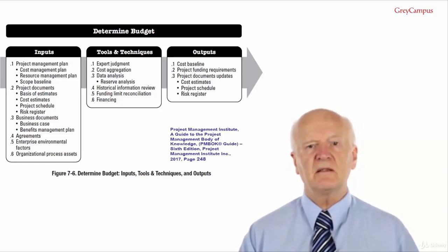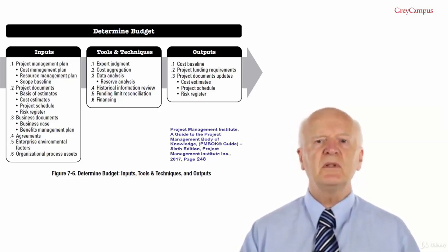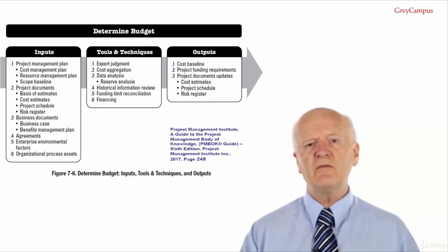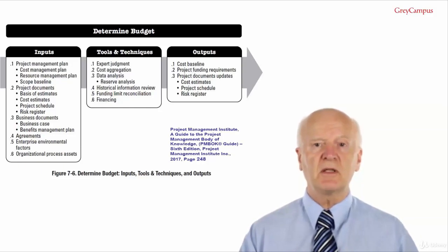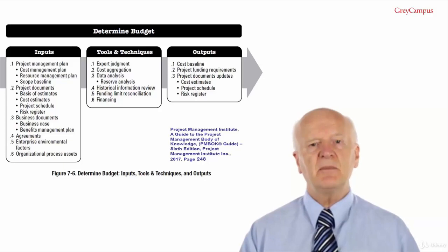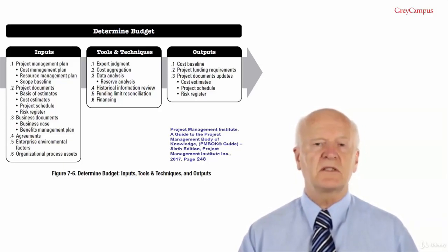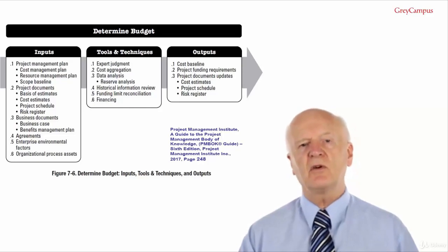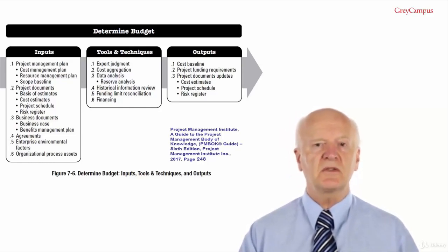What is net present value? It means the value of a future asset, income or cost in today's terms. For example, a product which the project will produce in 1 year's time will have a value in 1 year's time of $1,100. But suppose the interest rate is 10%, that means in today's terms the product would be worth $1,000. So the value in 1 year will be $1,100, but the net present value, or NPV, is $1,000.